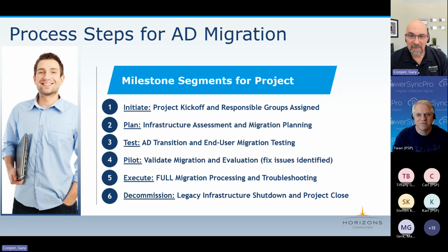So, the entire migration process for Active Directory on premises is really a 6-phase approach, starting with project initiation, wrangling in your executive sponsors and senior management, making sure that the organization is aware of the activities that are going to be coming and what impacts, from the business to IT leads to IT groups, IT leaders, application support.